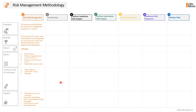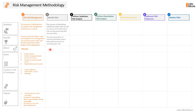Once we have a solid risk management plan, we can start identifying the project risks. This process involves identifying individual project risks as well as the sources of overall project risk and documenting the key characteristics of all identified risks. Throughout this process, we will use techniques like brainstorming, expert judgment, interviews, and focus groups in order to identify as many potential threats and opportunities in the project as possible. We will also determine the key characteristics of those identified risks.